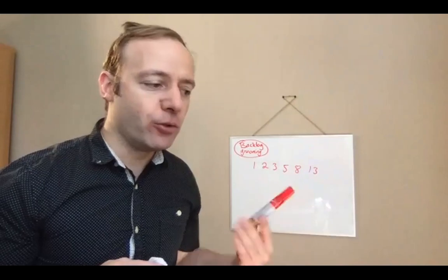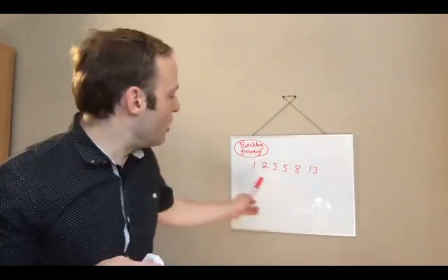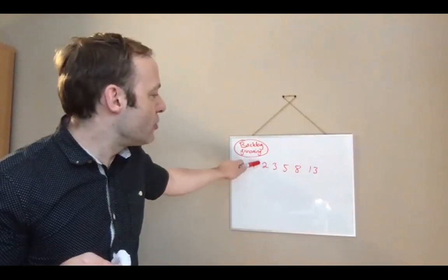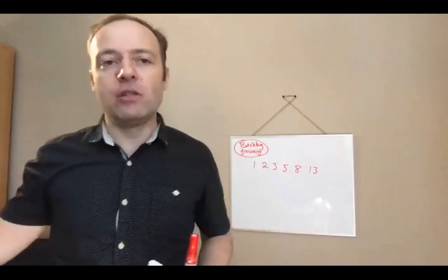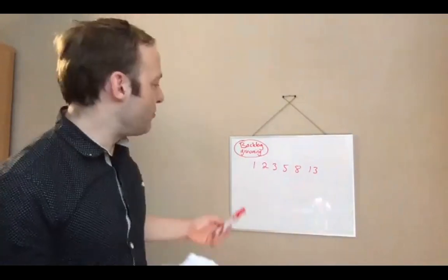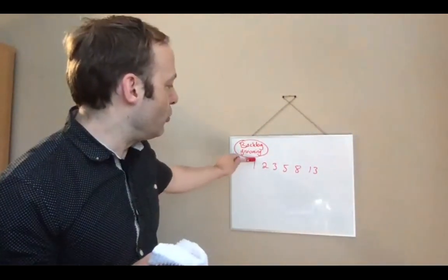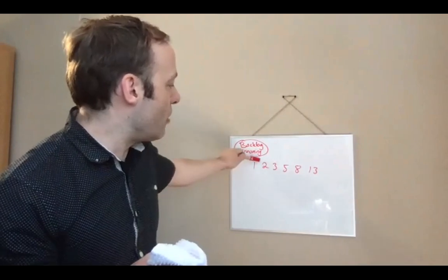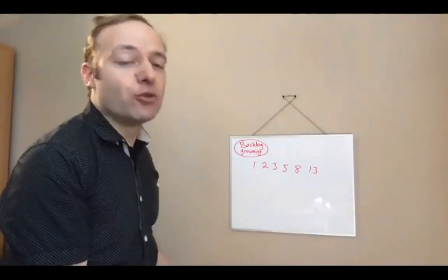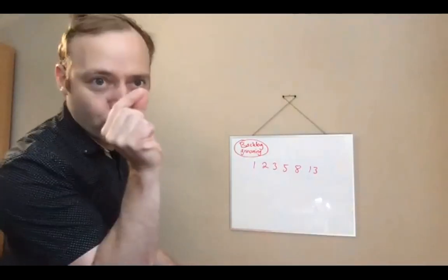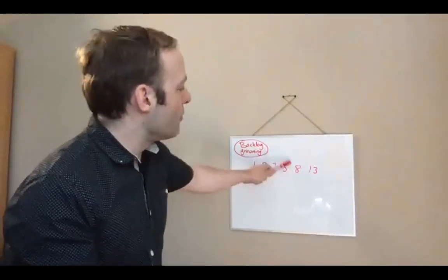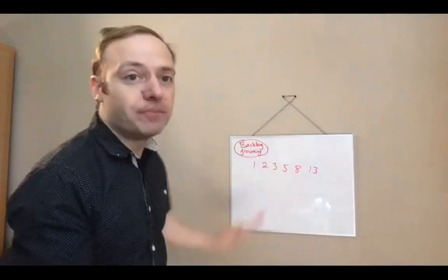So I highly recommend that you use complexity, where 1 is the smallest possible task, because developers will have a lot of overhead just to do a simple task. They need to resolve any Git conflicts or that kind of stuff. And also, they need to come up with an architecture, do the commit, push the commit. That's a lot of work just for doing a simple task. So you don't want to break the project into tasks that are too small. You want them to be around 3, 5, or 8 points usually.